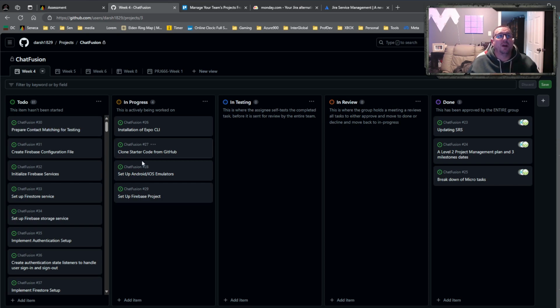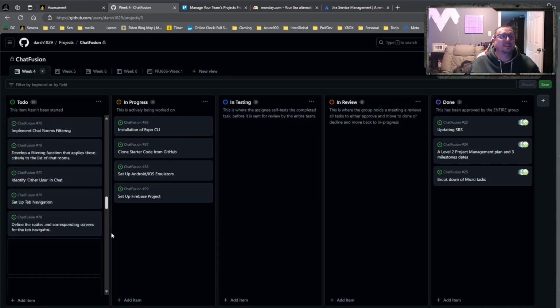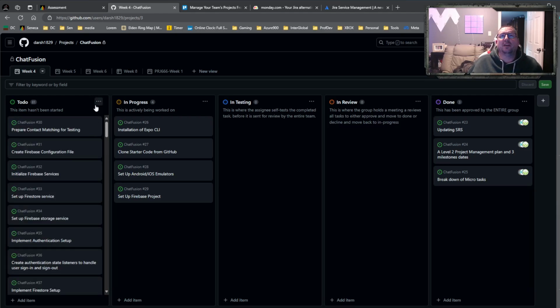So now I have projects, and as you can see, these guys have 81 to-do tasks listed here. I was very succinct with them that they should have micro tasks, so they're very small. So there's a lot of them, all right, but they're each small, and so you can assign 3 tasks to a person, and like 3 days later they come back and they're all done, right? It's not a task that's going to take you 3 days. Every one is like an hour, right? They're little tasks, okay? Then what's going to happen is you're going to set up this Kanban board.